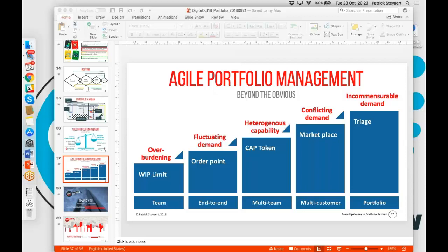Right. So that's very much in the spirit of Kanban. We represent capacity by WIP, not by number of persons. In fact, in SwiftKanban, I should mention this, and it probably responds to some of the other supplementary questions, you can define WIP limits in terms of either the number of cards, the number of items that a person can work on, or in some total of another unit of measure, such as story points or hours.